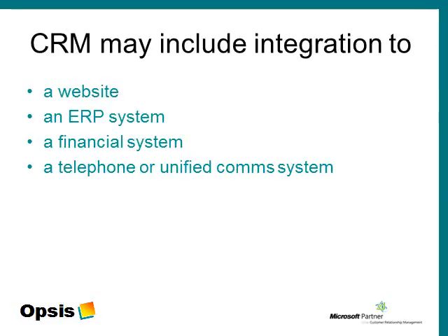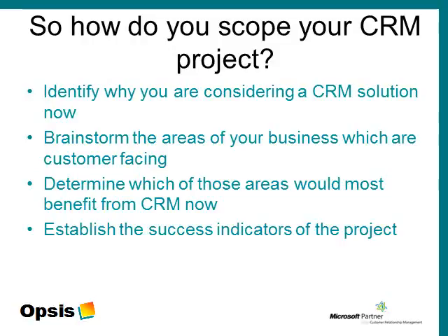Although it is usually recommended to leave the implementation of the integration to CRM until CRM itself is working for you, it is important to look at potential integration points during your scoping exercise. This is because the future integration may change how CRM itself is implemented. So how do you scope your CRM project?